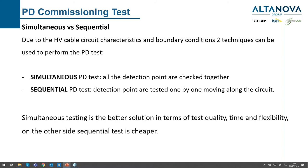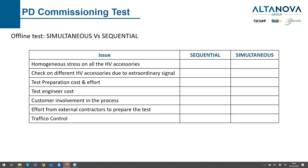During commissioning there is another choice to make: simultaneous or sequential PD testing. In simultaneous PD testing, all detection points are checked together. In sequential testing, detection points are checked one by one, moving along the circuit. Simultaneous is a better solution in terms of quality, time, and flexibility, but it requires many operators, many acquisition units, or an infrastructure to have all signals available. Normally, sequential is the cheapest way to test the cable.